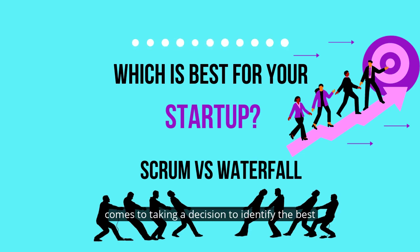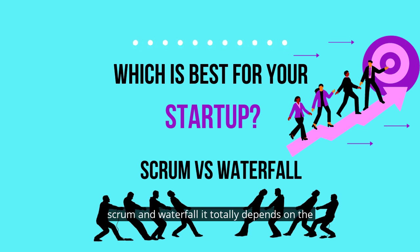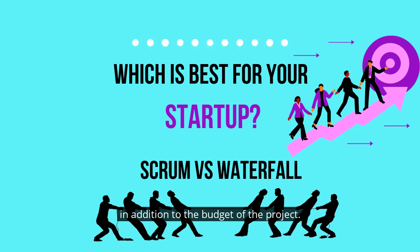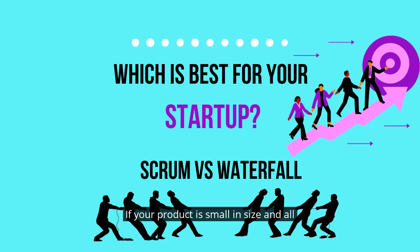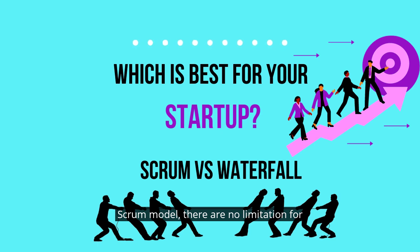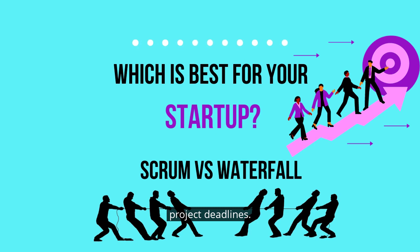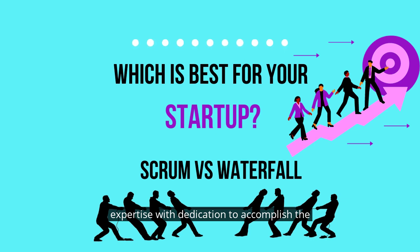When deciding which methodology best suits your startup between Scrum and Waterfall, it totally depends on the scope, size, amendment needs, and budget of the project. In the waterfall model, you cannot go back and make changes, making it highly expensive for big-sized and complex projects. If your product is small and all requirements are clear and known, you can choose the waterfall model. In Scrum, there are no limitations for amendments, but it becomes uncertain to define project deadlines, and team members need experience, expertise, and dedication to accomplish the given tasks.